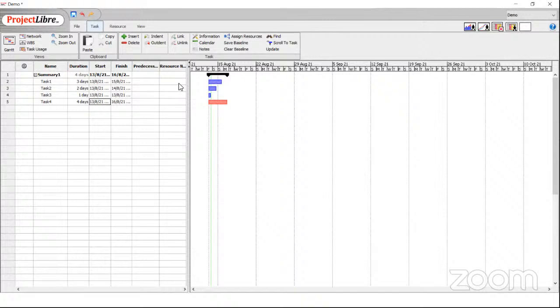Now you have to put in resources, and we define resources as person one, person two, and so on, right? So see what's happening on the right. Task one is to be done by person one, two is to be done by person two, three is to be done by person three, four is again done by person one. So it is labeling each task with the resource who is supposed to carry out the task. Now we still haven't defined any dependencies. So let's go about doing that.